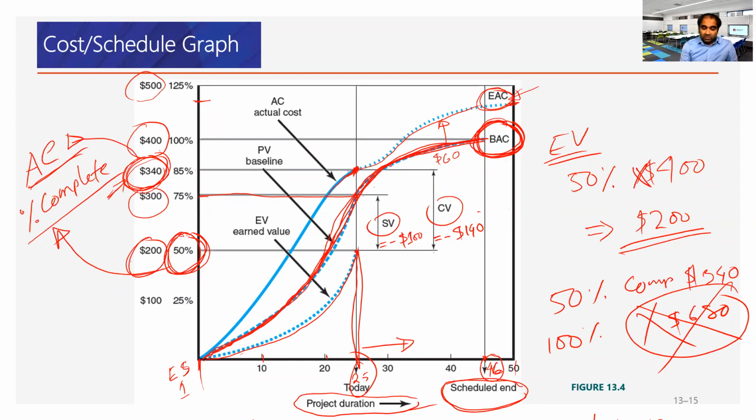The remaining 50% here, this is the remaining cost. You can see this curve is a little bit flattening. That means it's not rising in the first half, but the second half is a bit flattening curve, so we may be needing less amount. It's not a numerical double, but it depends on the factors involved in the time phases here.